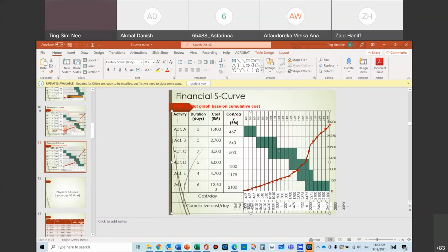With that, check what money has been paid fully up to this point in time. The actual cost that has been paid to you, you key in up to this point in time, you just punch in the value. The total is cumulative also. You just punch it in and draw it. It's up or down here, we don't know. The client could have paid you a lot more, or a lot less as well. Then that is your AC.